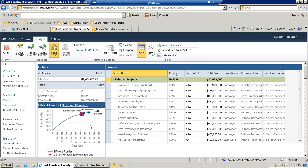We have this little graphic here called the efficient frontier. Where you see this line start to flatten out indicates where you may want to optimally invest. Because right about the $14 million mark, I'm getting 80-some percent of my value, but I've been able to cut more than a third of my cost. So where I start to see it flatten out may be the optimal investment in that portfolio.